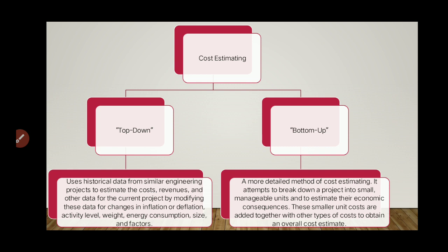Let's say, yung example kanina na pagtayo ng two-story residential building. Yung excavation, magkano yung magagastos, yung footing, yung foundation. Sa kada specific work, dinidetermine mo kung ilan yung magagastos. So, napaka-detail sa bottom-up.